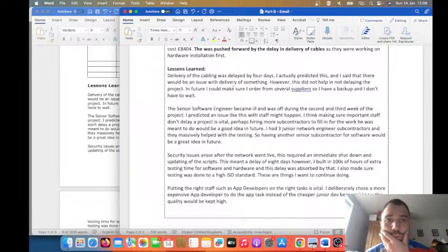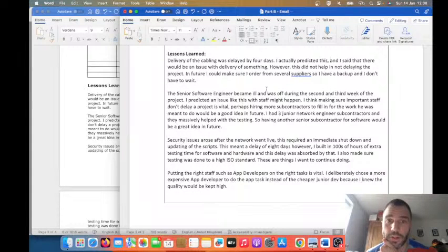I said that there would be an issue with delivery of something. However, this does not affect a delaying project. In future, I could have made sure that I ordered from several suppliers. The software developer is ill, but I also predicted that, and I'm making sure that staff today. So maybe we will hire more subcontractors in future to fill in the work. It's a good idea. 3 junior network engineers.